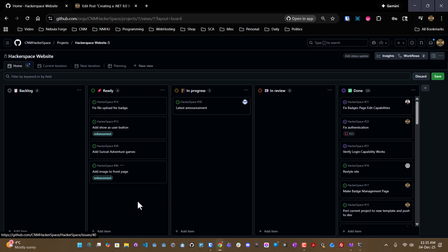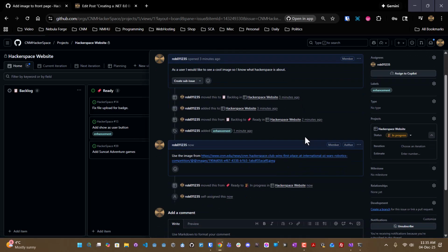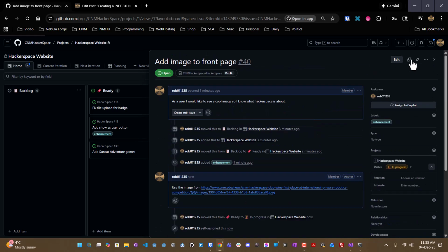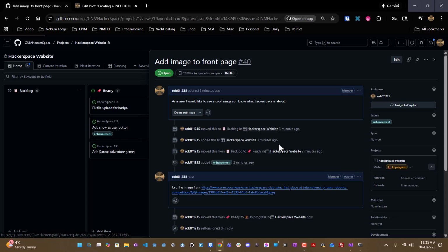So now here I am, a software dev. I'm at my desk. I'm like, okay, let's see what other things to do. Oh, you know what? I've got about 30 minutes. I could probably knock this one out. So what you do is you drag that over, and I'm going to assign myself to it. And what that does is it makes it clear to anyone else who's coming to this board, oh, Rob's going to do this one. So we're not going to have 5 people doing the same task. It's a form of deconfliction when we do that.